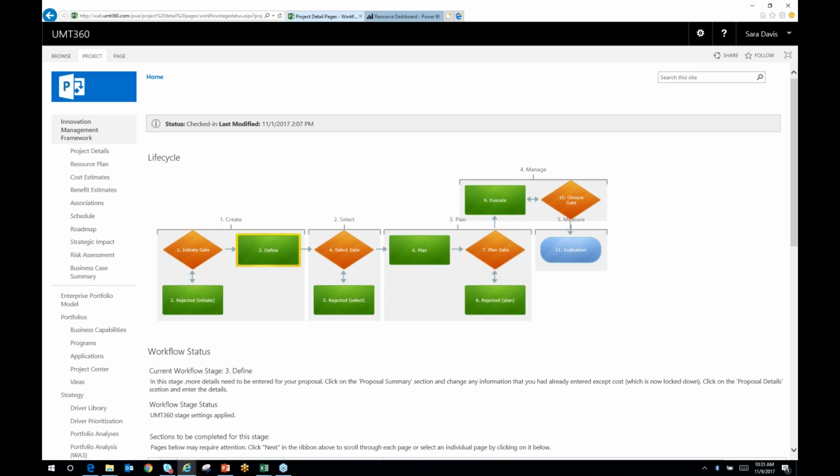So at any point in time, we can take a snapshot of our resource plans, any of the dimensions in the resource plan, triggered automatically through workflow events. So that's kind of what we call entity-based snapshots. There's also portfolio-wide snapshots where, let's say, maybe quarterly, monthly, whatever you want to be doing, you're taking a snapshot across everything in a portfolio, and again, across all the values, resource, cost, benefit, milestones, whatever's allowed to be in these snapshots. So you can take portfolio-wide snapshots on a recurring basis, and you can have sort of governance-approved snapshots on a project-level basis. It's a very important feature.